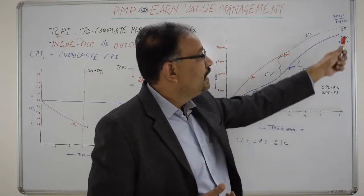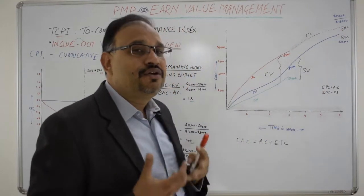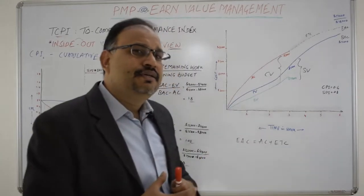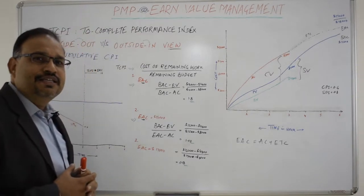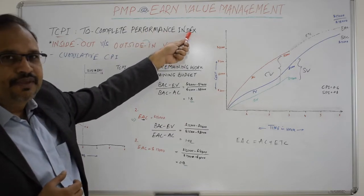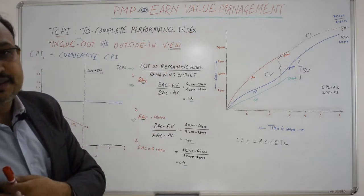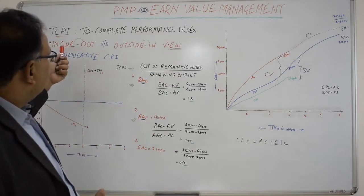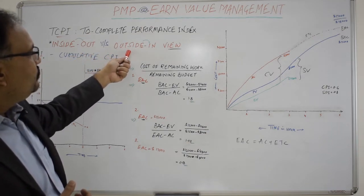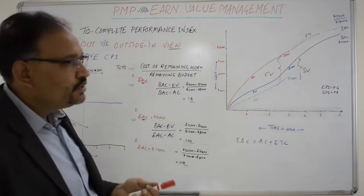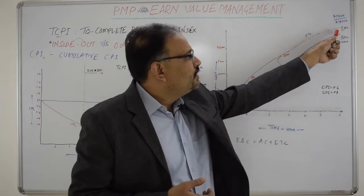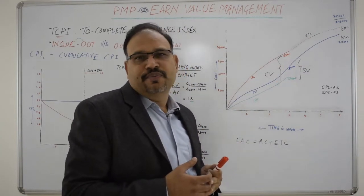Or the project may revise the BAC to arrive at a fixed EAC and understand the desired cost performance level needed to catch up with that amount. This cost performance level is what TCPI — the To-Complete Performance Index — focuses on. The key difference from other forecasting methods is that other methods give an inside-out view, while TCPI gives an outside-in view: given the BAC or EAC target for the remaining duration, what is the desired cost performance index needed to achieve it?